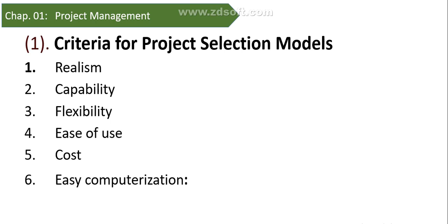Fifth, cost. Data gathering and modeling costs should be low relative to the cost of the project and less than the potential benefit of the project. All costs should be considered, including the cost of data management and running the model.